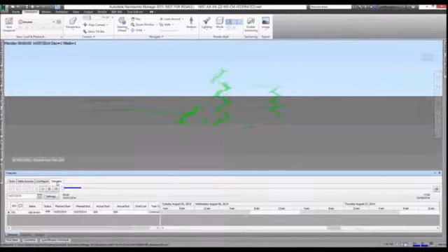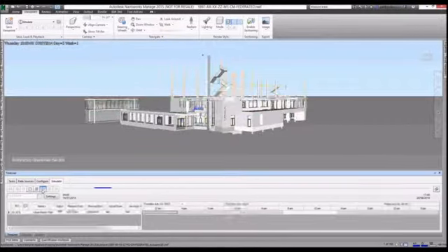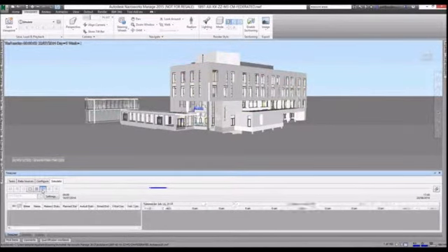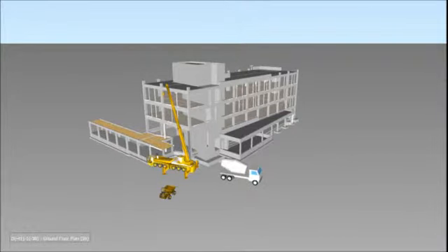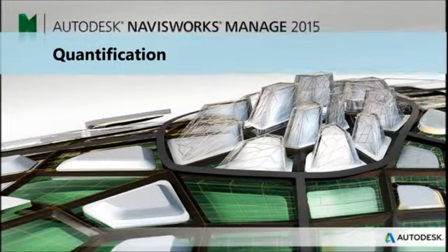floor. Contractors can add additional items to the model, such as hoarding, site huts, craneage, scaffolding, and other elements required to construct the building, to include in the simulation. Elements can be animated and even added to the timeline and included to allow for time-based clash detection.